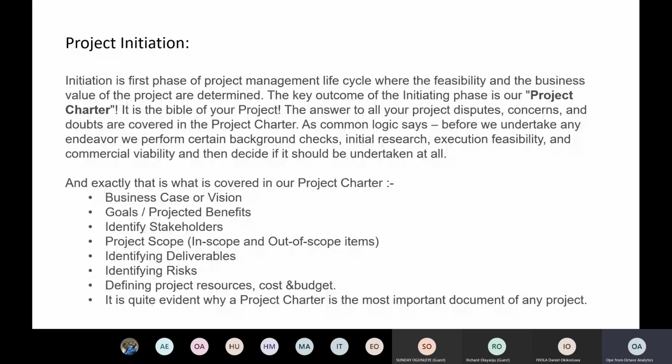But irrespective of our request on the proposal, clients most times still give us less memory space than we request. But because you are aware and you've checked what you requested against what they are giving you, you already know that's a risk. Then you can mention it to the client ahead of the project, and when there's a red flag on it, you raise it again. So identify such risks.